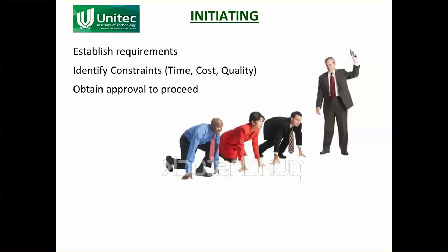You need to get an agreement and a contract, and what normally happens is a consultancy agreement is signed. So now the client has said, yes, I want you to do this work. We've agreed on what that work is, and yes, I will pay you for it. That's quite important. Once you've received that confirmation, once you've got that agreement, you can go on and start doing the work. If you don't, then there's no guarantee you're going to get paid for your work if you're a consultant.